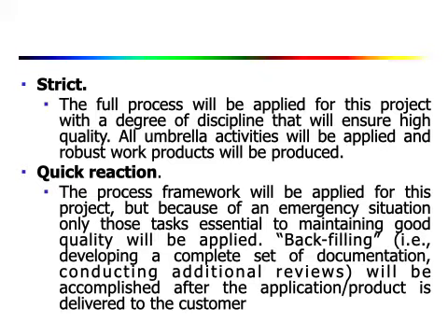Backfilling will be accomplished after the application or product is delivered to the customer. Backfilling means developing a complete set of documentation, conducting additional reviews. Okay, so these are the four types or four degrees of rigor a project can have.